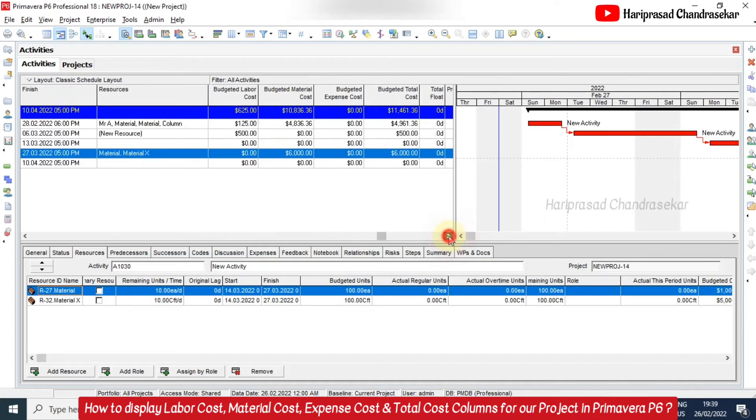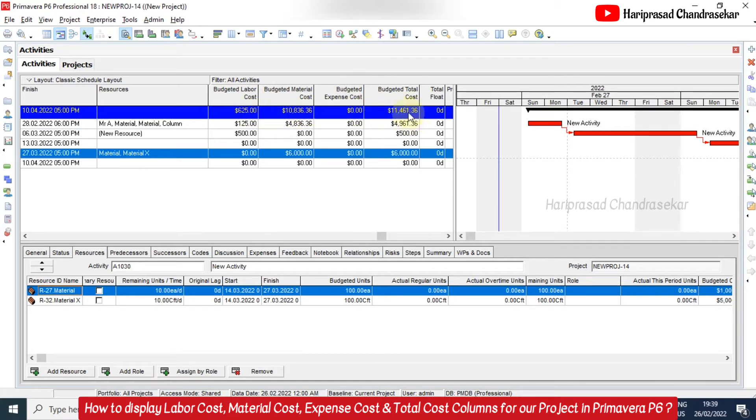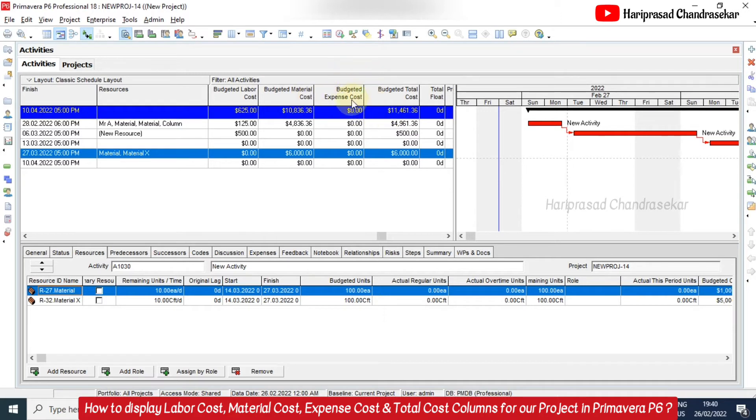Then we can see the split up. Only the labor cost is coming around six hundred twenty five dollars. Material cost is coming around ten thousand eight hundred and thirty six point three six dollars. So expense cost we don't have. When we add these two we will get eleven thousand four hundred sixty one point three six dollars. So like this we can have different columns. We can customize our columns in Primavera.